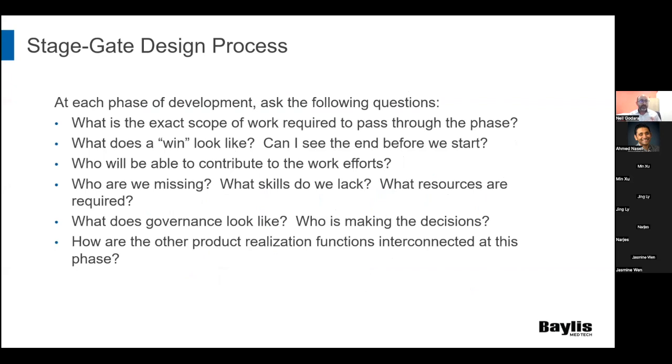I know that might sound trivial, but if you actually start thinking about it and go through the different inputs from IP, regulatory, marketing, clinical, sales, whatever, and think about what exactly you need to know in order to say you're ready to invest in the final commercial embodiment, there's actually quite a bit of discussion that happens inside the teams to say, do we have everything we need to get there? And if you realize you don't have everything, well, good to know that at the beginning, and then you can start building out the plan to make that realizable.